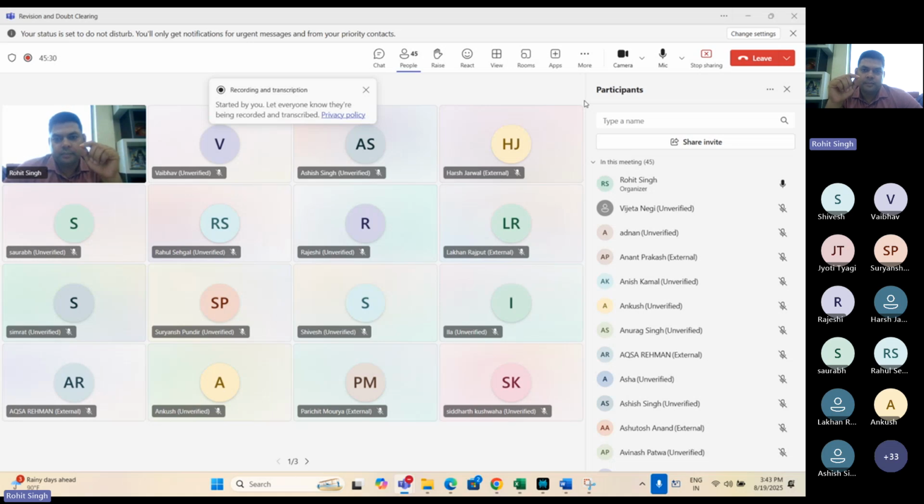Let's say in a project we have 1000 subtasks and we have 10 months. So every month, 1000 tasks over 10 months, we are doing 100 tasks a month, which includes as-is tasks and to-be tasks, including all the changes, enhancements, and customization.